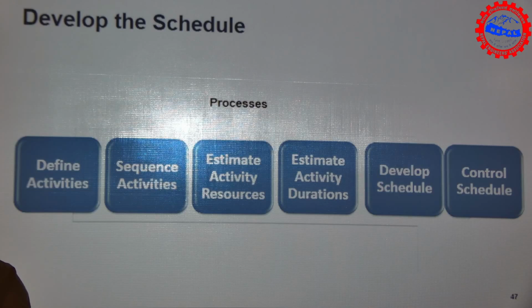So one of the challenges here, whoever is developing the plan, the planning engineer or planning manager, the main job is to estimate the project duration. How long will it take? There are two ways, depending on the constraints. If your resource is limited, and you develop the plan, it will be 3 years. If you increase the resources, by giving additional resources, you can shorten the project duration. So there is a big challenge in identifying the right time. Is the 2-year estimate or the 3-year estimate the right time? Who is going to tell that?